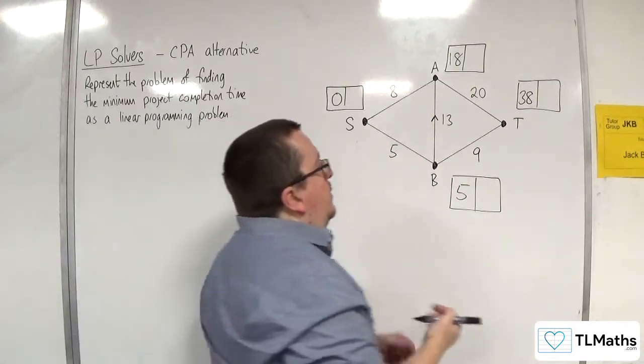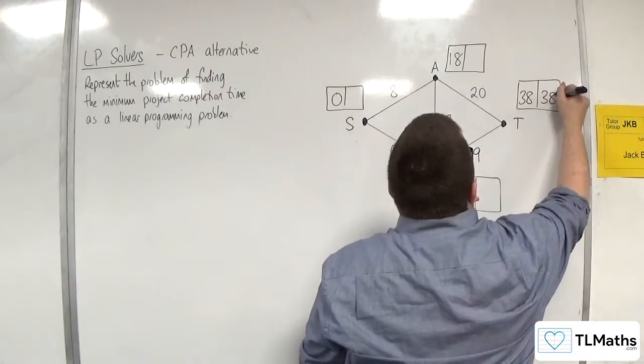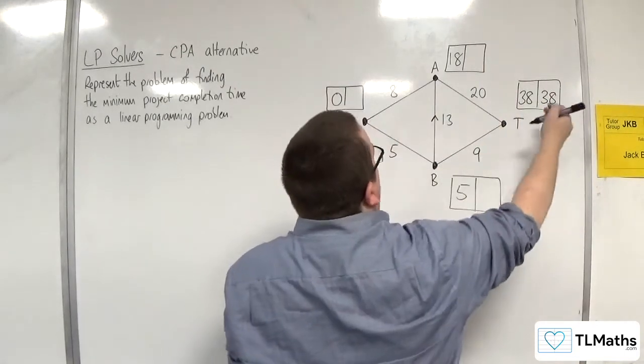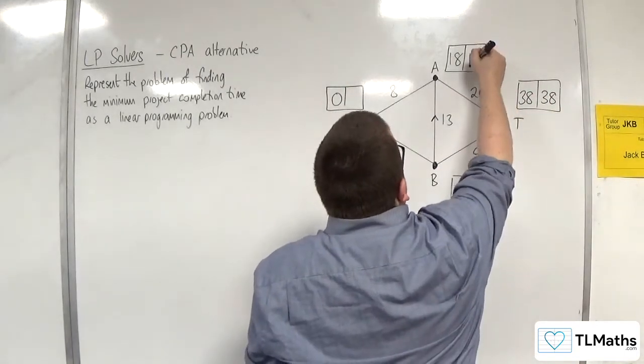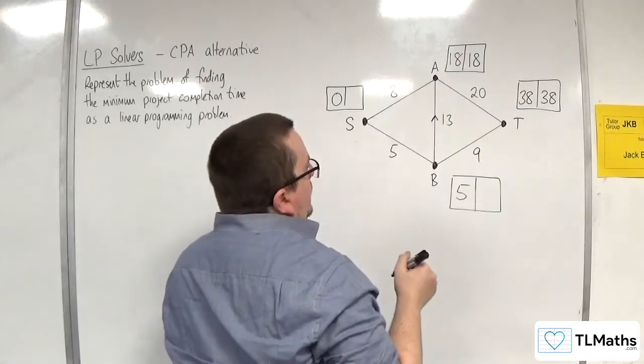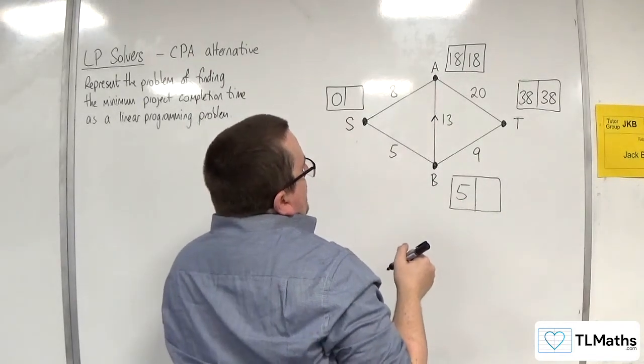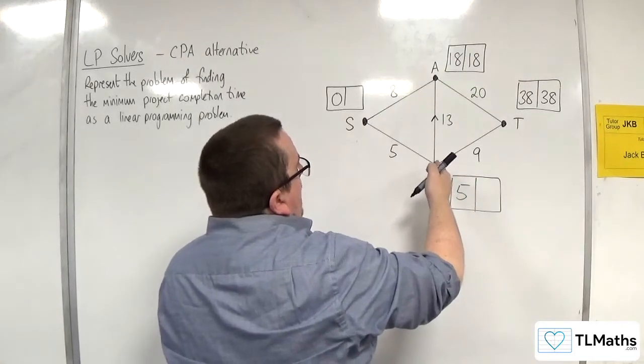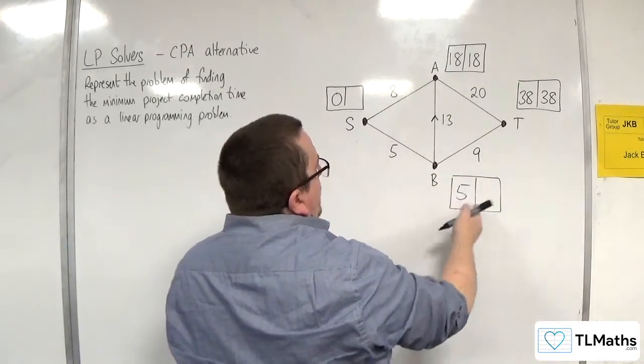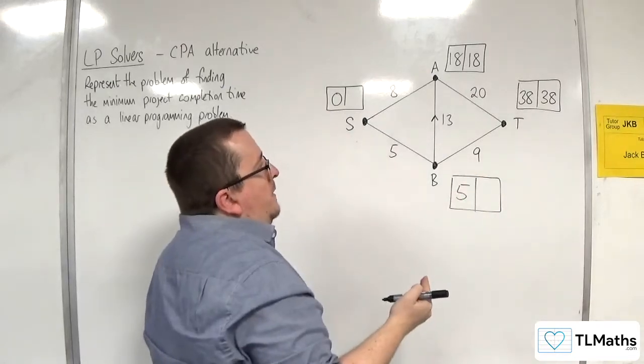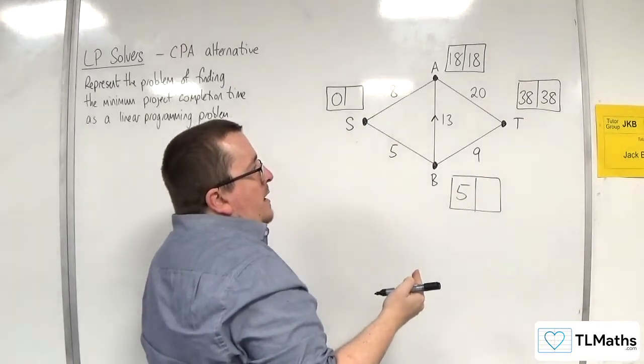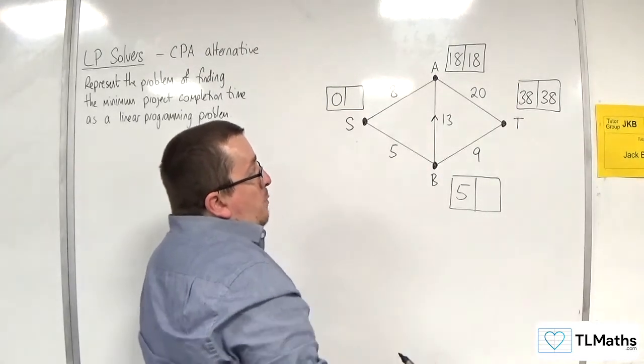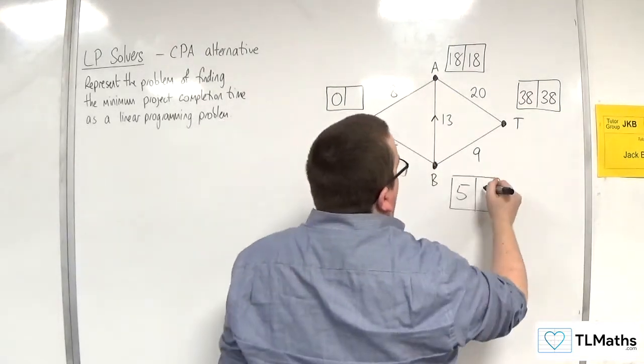And then the backward pass, that's going to have to be 38. So 38 take away 20 will get me the 18. Now, 18 take away 13 will leave me with 5. Or 38 take away 9 will leave me with 29. So I take the smaller of those 2, which is the 5.